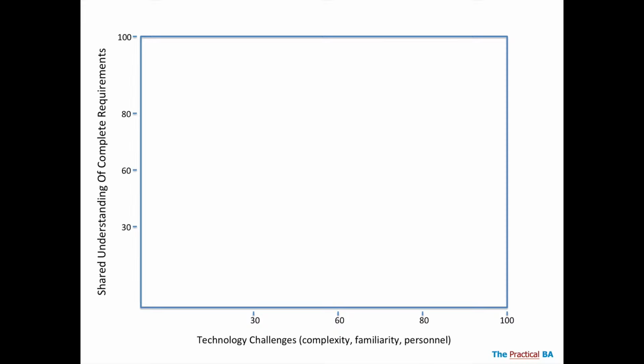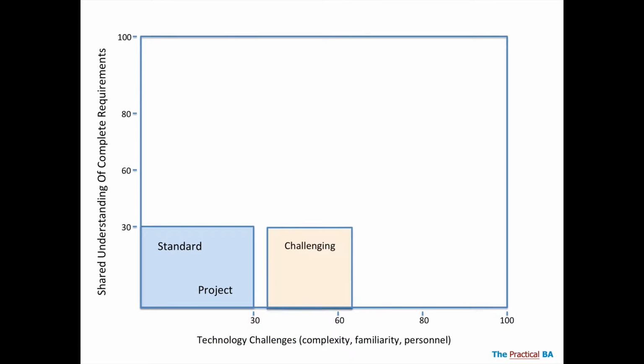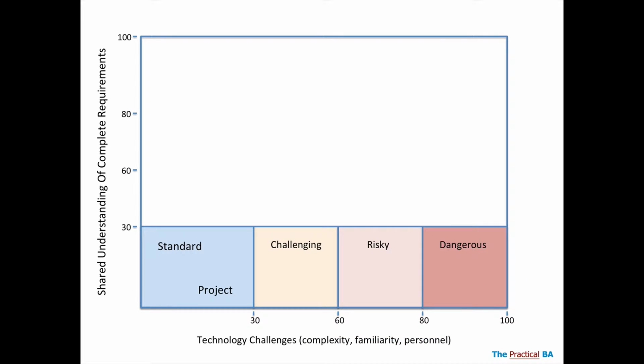So, this is a technique for analyzing risk called the House of Pain. And if you do a Google search for that, you'll find a lot of different takes on it, and this is mine. So along the bottom, we're talking about the tech that is going to be used to meet our goals. And it's not just how complex the tech is. It's also an alignment to the resources that you have and how accustomed they are to that tech and how well they can pivot or adapt to using that tech.